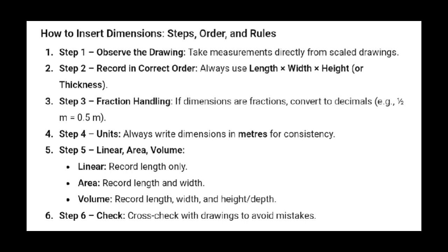Dotting is used for single occurrences. The dot is placed below the top figure to avoid confusion with decimal points. Dotting improves readability and ensures that single items are not accidentally multiplied.